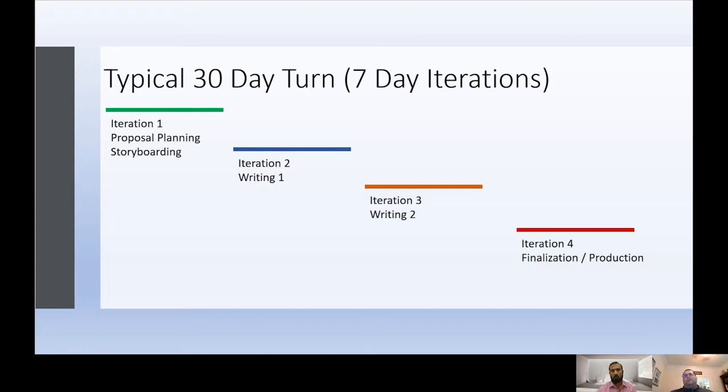But why not do your reviews based on your iterations, where you're reviewing your storyboards, your first writing iteration, your second writing iteration, and then you're reviewing your productions. And now your dates don't change, because Friday comes when Friday comes, and you're reviewing whatever you finished, not any kind of crazy red team thing, which is different in every single company that I've ever been at, and creating new colors, Auburn team, and all that kind of thing.